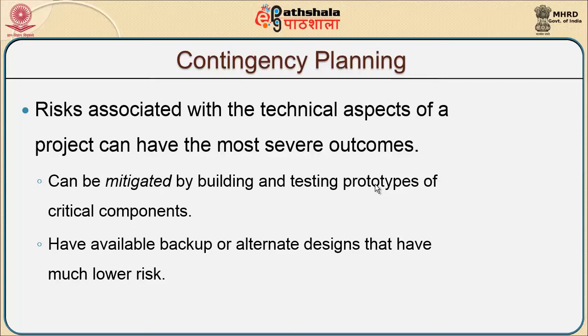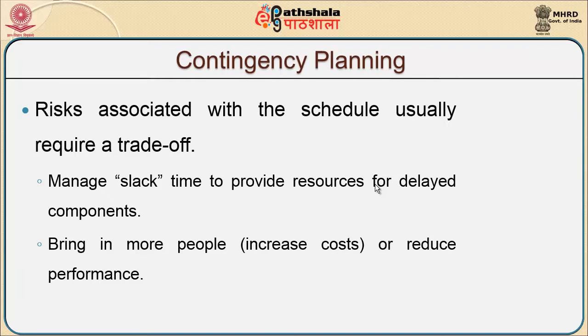Mitigate by building and testing prototypes of critical components. Not just that, we may have to make the backup available all the time, and alternate designs would reduce the quantum of risk. Because of such a risk, the schedule usually requires a trade-off, whereby we can manage the slack time to provide resources for delayed components. We can also bring in more people to reduce the performance impact.